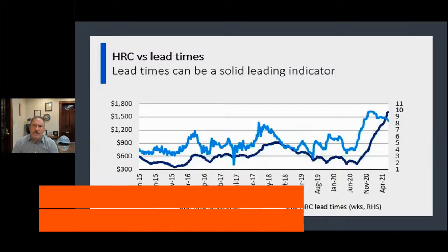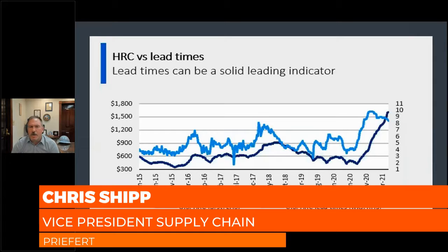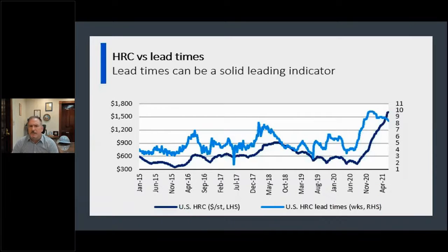One thing to keep in mind and to look at is, with these high prices of steel, when do they start softening? Well, one of the definite things you need to look at is how are lead times? I truly believe the lead times are being a little overinflated. We're definitely seeing hot rolled coil availability still in July. We're seeing cold rolled coil availability still available in the United States in July. Those are significantly lower lead times than what some are reporting. So lead times is the key, and we're definitely starting to see a little softening.